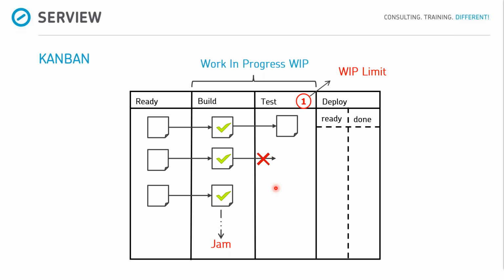And you also can measure the process by the delivery rates. You do this by looking at how many tickets you have completed in a given period of time. It's called throughput. So that you can see in the future how many tickets you can work in a period of time. So it's like your capacity for, I don't know, for the next 4 weeks, for example.